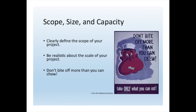A clear project scope will help you identify appropriate items to include in your project, as well as giving you grounds to exclude inappropriate ones. You may be working independently, or you might be working with partners, and there will be parameters to keep in mind as you select content. Those parameters might include typical project management considerations such as money. Be aware that there are costs associated with gathering, scanning, and describing each item, so you'll need to figure out how many items you can include given the funds and time available.